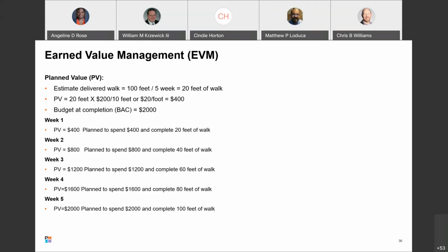Your budgeted completion, when you talked about cost, you estimated using parametric estimates, analogous estimates, or bottom-up estimates, and you totaled all those things up and rolled them into your budgeted completion.